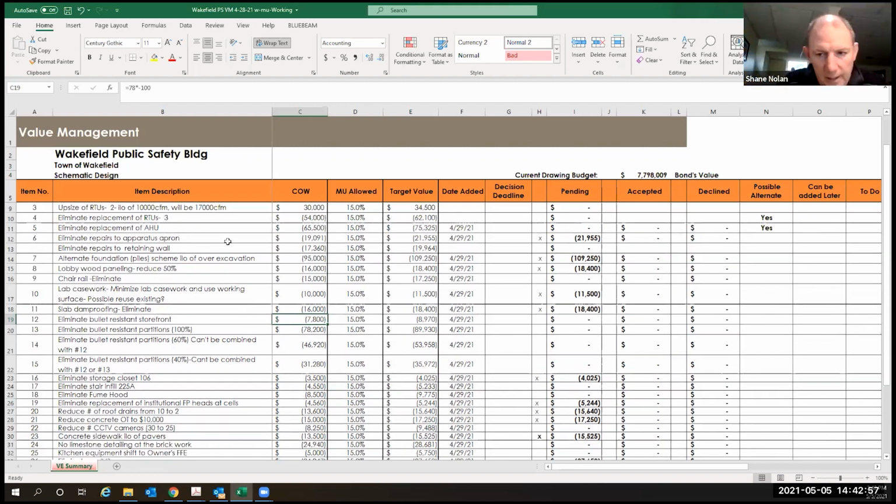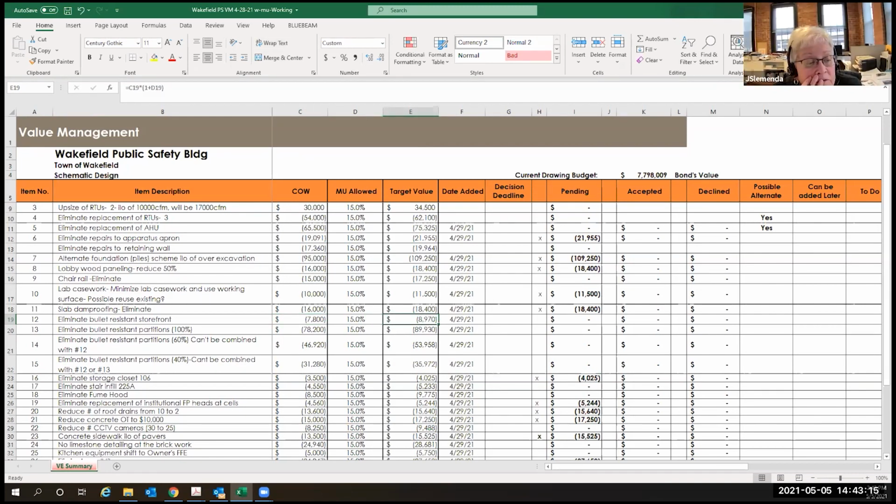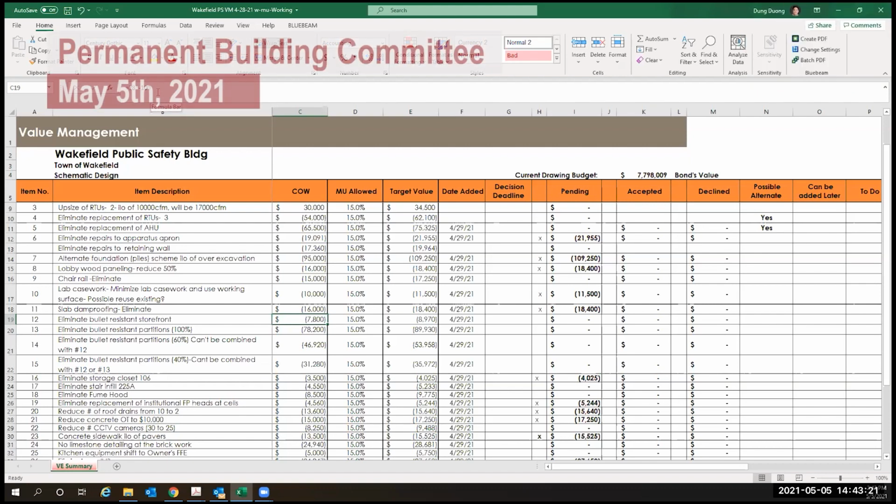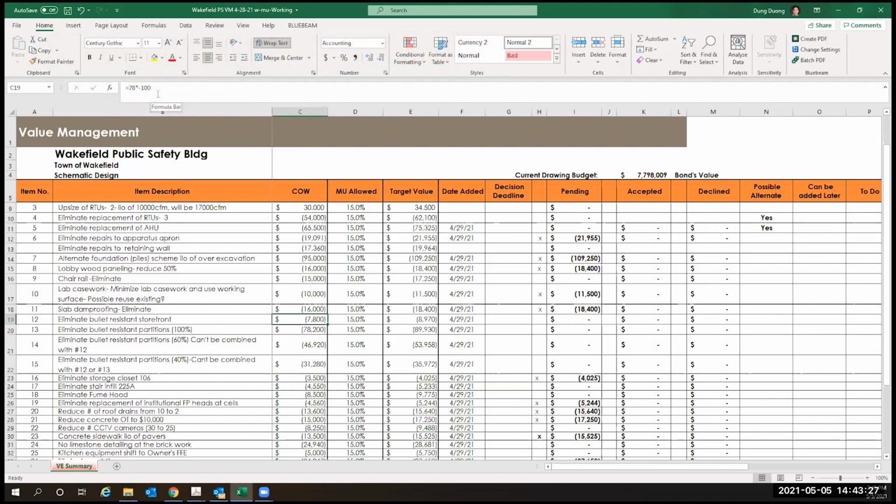I think we're putting something in the bathroom right next to it anyway, because there's a window to that bathroom. But that value, Doug, so it should be 11.7, no? 78 square feet by 150. No, I took off $100 a square foot for the bullet resistant, and kept the $150 for the aluminum storefront. Justin, do you think we should take off more for the bullet resistance? Yeah, to Shane's point, just to be consistent with our other unit pricing, I think you had $100 off. Sure. So how much again? I'm sorry, $150. Cool. Okay. Yeah, no problem.